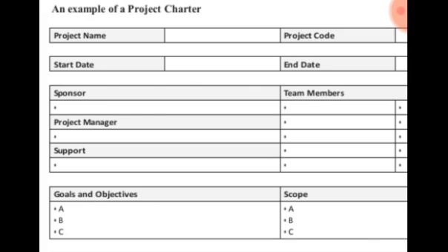Then the next one is the security. Now you also define the scope and what is going to be done to meet up with that objective. You can say, okay, maybe instead of wiring the street lights and connecting them to NEPA source, let us instead use a solar system. Because if we say we should use NEPA source, there is a tendency that NEPA can take the light even at critical times and make the whole place dark, and the purpose of that objective will now become defeated. Understand? So instead of relying on NEPA for the source, let us make it a solar system so that at all time the light will be there, thereby eliminating that security challenge and delivering that objective.